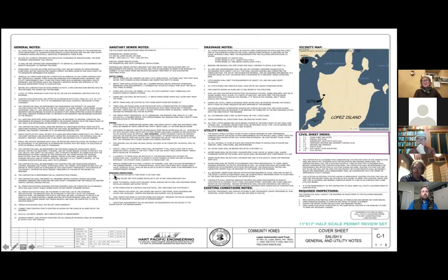And then this part about inspections, I think we've mentioned this and tried to emphasize it, but not overemphasize. Always when you're planning a project, really plan in for when you need the inspections, because if you don't, you could find yourself stopped on a project when there's really no need to be. So just be aware of that when you have to do that.